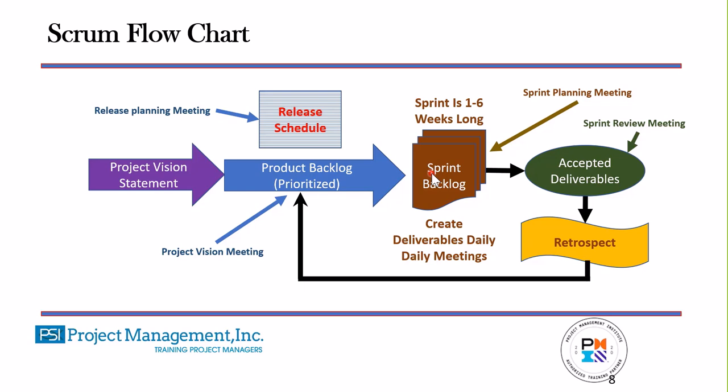Scrum is a little bit different. I will start executing these actual iterations or sprints. Once I have delivered a sprint, I've completed it, the customer will accept those deliverables. We'll have that sprint review meeting. And then once the customer has accepted those deliverables, we will sit down and do our retrospective and come up with improvements.